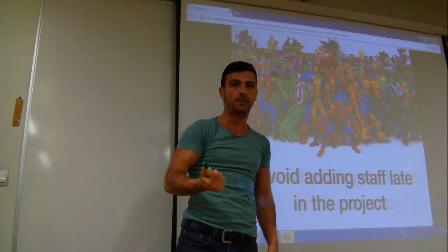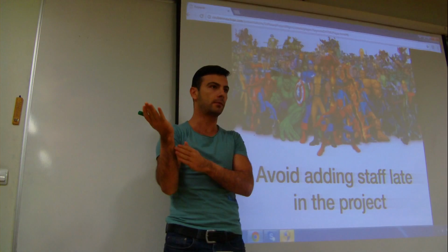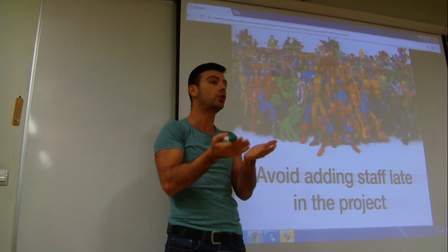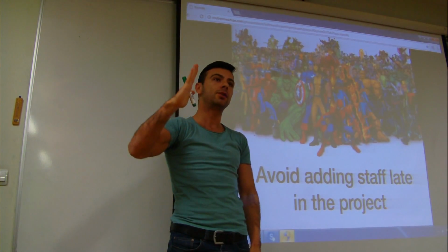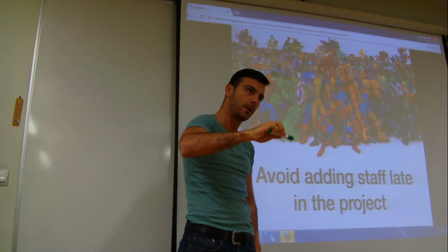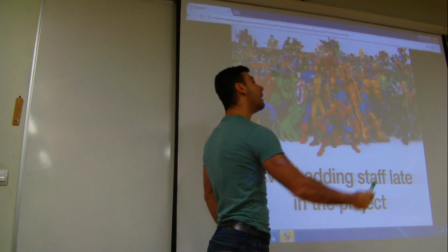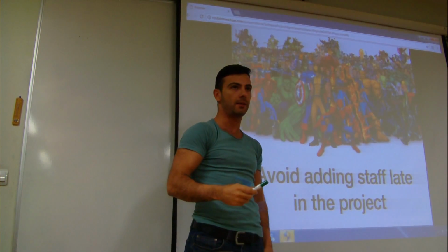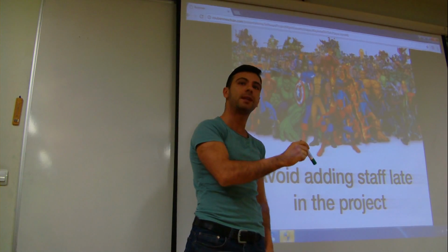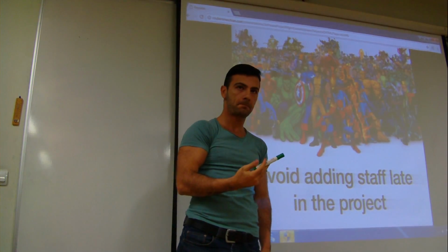Sometimes it's necessary. For example, one of your engineers quits. You need a replacement. Sure, sometimes it's necessary. But understand there will be a penalty. Understand that there will be a dip in your process, and then eventually, once that developer gets up to speed, then development will go up again. But understand that there will be a decline in the beginning. It's a penalty you have to pay. Okay?